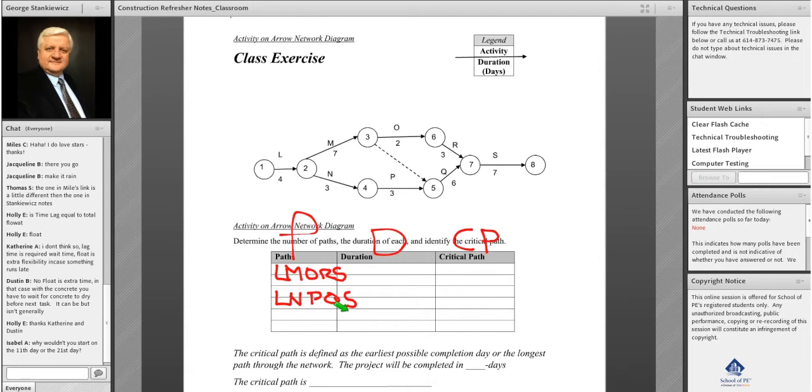Is there any other path? Well, the dummy is a path. The dummy is a logic provider in the project schedule. They do not have any resources associated with it and there is no time, but it's a valid path, so it provides us with the logic. So we have L, M, Q, S.